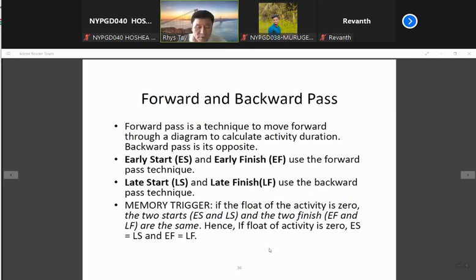That means to say your schedule, you planned it very nicely, fitted to the hour that you want, and it will finish on time. No float, no extra hours for you to overcome some contingency issue, like your plant not growing or you change the plant or whatever. So there's no time for that. So once you plant, it's straightforward. All right.